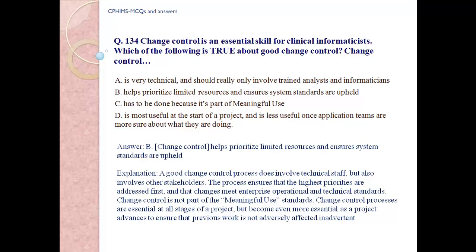Explanation: A good change control process involves technical steps but also involves other stakeholders. The process ensures the highest priorities are addressed first and that changes meet enterprise operational and technical standards. Change control is not part of meaningful use standards. Change control processes are essential at all stages of a project, but become even more essential as the project advances so that previous work is not adversely affected.